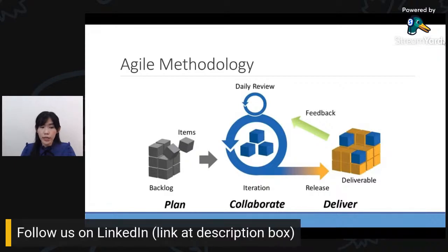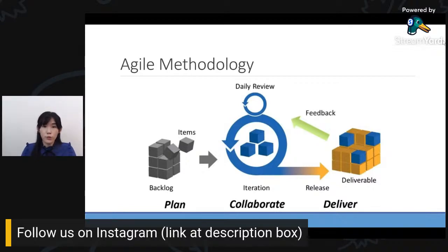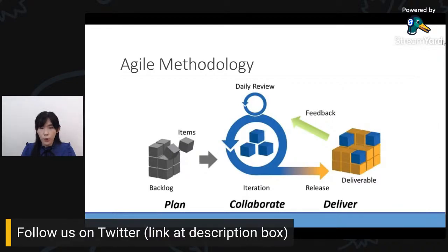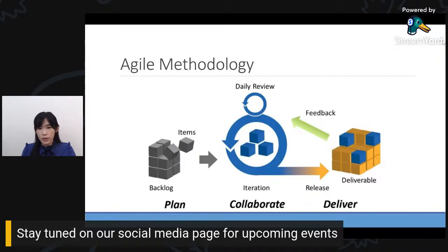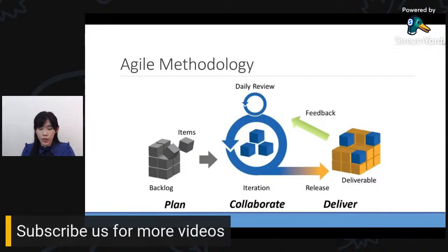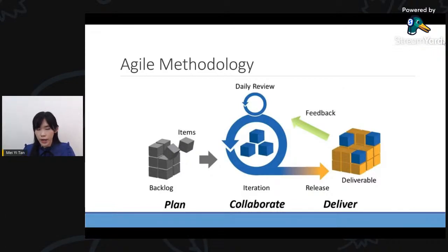For those who are really new to these words, of course, we can understand it as a phase. We have different phases. Usually for a sprint, the duration will be 1 to 4 weeks. So we call it a time-boxed sprint. So we have all these sprints within 1 week to 4 weeks. It depends on how you want to plan it and how quickly you want to release these systems or these functions to people to start using them.